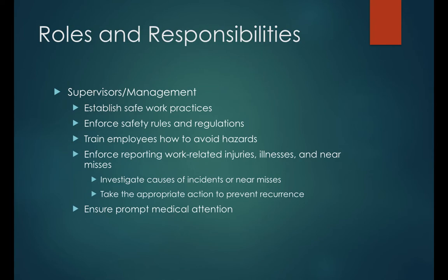No, if you have a severe injury, you want the project manager to direct that employee: this is our closest hospital to where we're working. Our safety program calls, if anyone has a severe injury, that they have to go to this hospital or they have to go to the closest urgent care. They have to get documentation saying that they are good to go and continue on working. Without that, we will not have you on this site if you're injured, because we don't want you to get even worse with your injury.